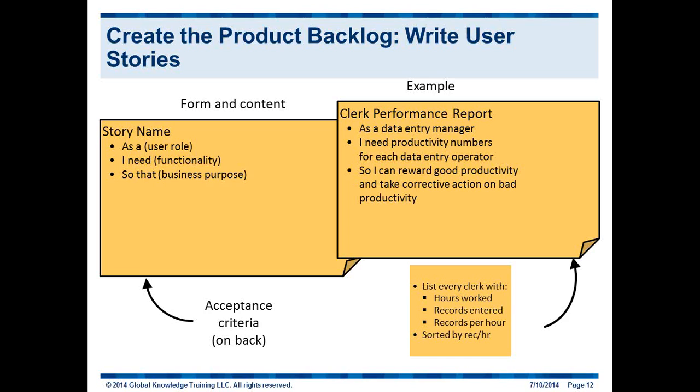The other reason why we write user stories and not use cases is because the user stories are very high level. As you can see, this is all we're capturing. This is as much of a requirement as we have, folks: just the user, what they need, so that. And this encourages us to have the conversation later once we've determined that we're going to work on the story in the sprint. The purpose for doing that is we want to incorporate the lean principles of reducing waste. Oftentimes, if we get into that detailed analysis at the beginning, and then for whatever reason we decide that we're not actually going to implement this feature, all of the time and effort spent doing the detailed analysis, capturing those requirements, is now waste because we've decided that we're not going to implement it after all.